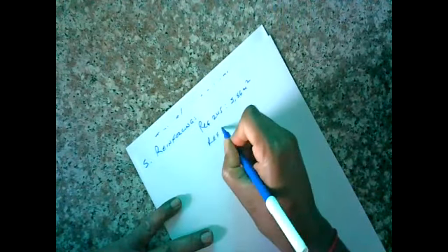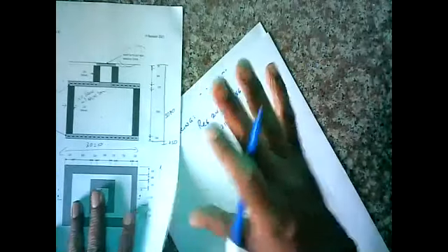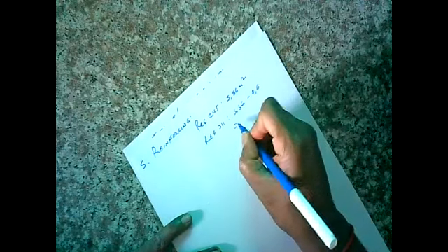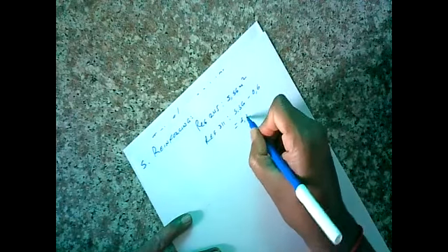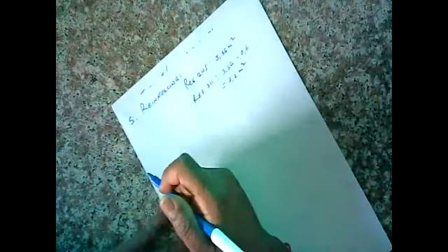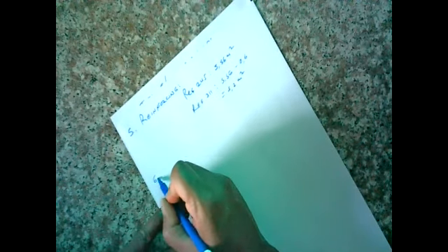But reference 311 is sitting in the roof, and there's a hole there. So we subtract the area of the hole, 5.56 minus 0.6, and we're looking at 5.2 meters squared. So that is the reinforcing.